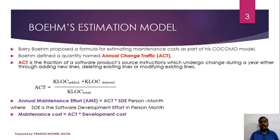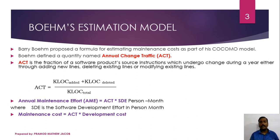Barry Boehm proposed a formula for estimating maintenance cost as part of his COCOMO model. Boehm defined a quantity named Annual Change Traffic (ACT). Annual Change Traffic is the fraction of a software product's lines of code which undergo change during a year, either through adding new lines, deleting existing lines, or modifying existing lines. So ACT equals KLOC added plus KLOC deleted, divided by the total KLOC available in the software product before doing the maintenance.